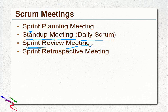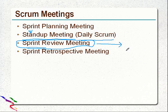The sprint review meeting takes place at the end of the sprint, where all the shippable functionality is demonstrated to the product owner and either accepted or rejected. All the accepted functionalities will be released, and items not accepted should go back to the product backlog.